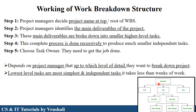In the second step, the project is divided into three main deliverable tasks. For example, College Management System is divided into three main tasks: Student Module, Teacher Module, and HOD Module. After that, in the third step, these tasks are again divided into multiple subtasks. For example, in the Student Module, there is student attendance, student awards, and student marks. These are the different tasks. This process is done recursively.